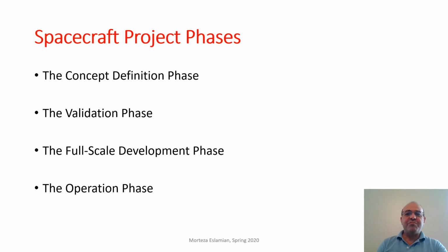So the spacecraft project can be categorized in multiple phases, similar to many other projects, not necessarily a spacecraft. Phase one is the concept definition phase. We want to understand the feasibility of the concept. We want to develop the concept and see whether it is feasible, and what it's going to look like.